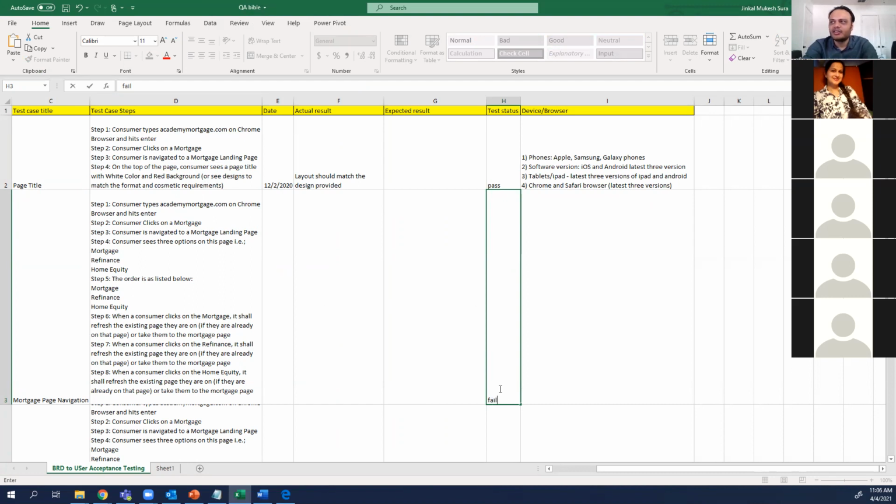And for the failed thing, you'll assign that to a BA. BA will work with you all, prioritize the defect based on the impact, and developer will again work in the dev environment, fix that code, and push it back to you all in test environment. So this is what keeps happening for 2 to 3 months in waterfall.